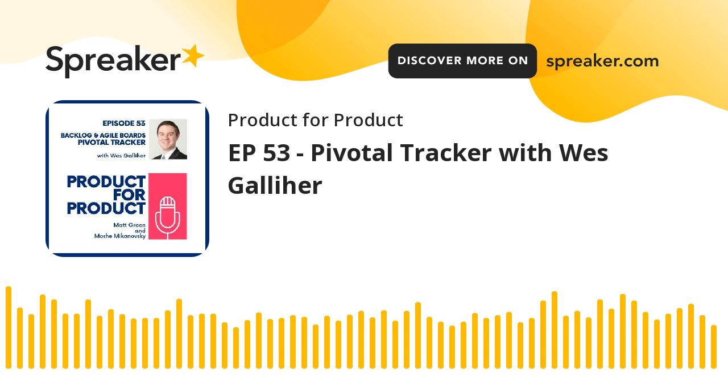And that's one of the big features of Pivotal Tracker: it's looking at average velocity. There is a velocity score, but it's also looking at variability. The whole objective of analytics and measuring the team is about how you can consistently deliver the same velocity. So the velocity may be lower, but you can consistently deliver it. That means you can predict with more confidence in the future how long things might take. What happens with a lot of teams is they just work 24/7 for like 3 days straight, and their velocity just spikes, and then their velocity is like net zero for the next 2 weeks because they just burn themselves out. That isn't helpful for anybody to predict going forward. So Tracker is actually focused more on averages and looking at the variability in that velocity score.